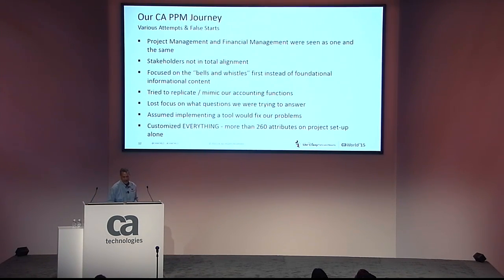Some contributing factors to our false starts really was a perception or belief that project management and financial management were seen as one and the same, so there wasn't a distinction. When we initially implemented the tool, we went in with a frame of reference from the financial side, and we thought that the financials were the driving factor. So we configured and customized it in a way to drive our financial reporting and cash flows.